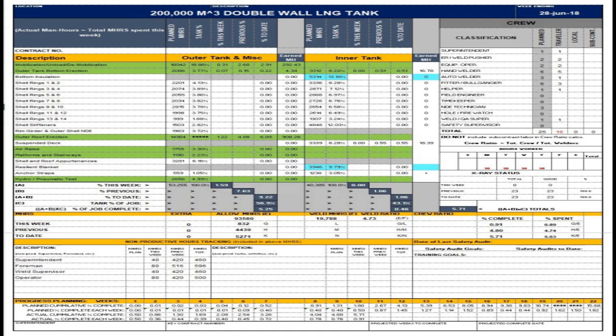As in the previous exercise stated, the purpose of this LNG tank progress report is to provide an evaluation of construction performance with respect to man-hours, allowing the user to identify areas of potential concern which would require further analysis. This report is structured by project and area unit. This report includes 5 sections: report input data, report results, crew report, non-productive hours tracking, and progress planning. The data formulation is explained in the following paragraphs.